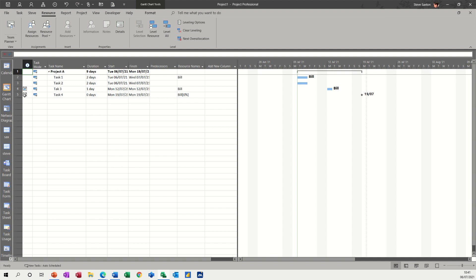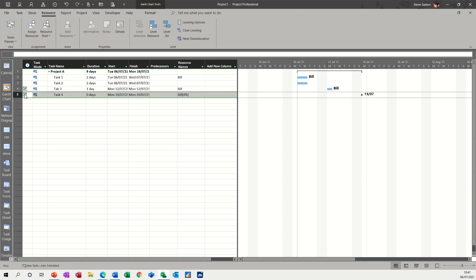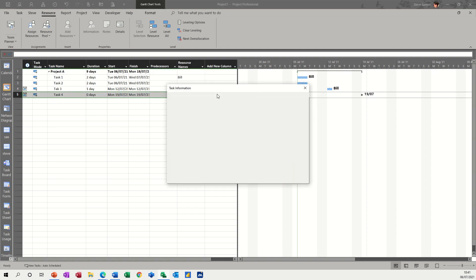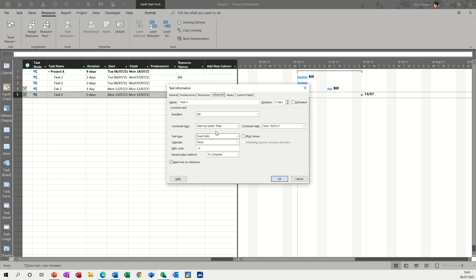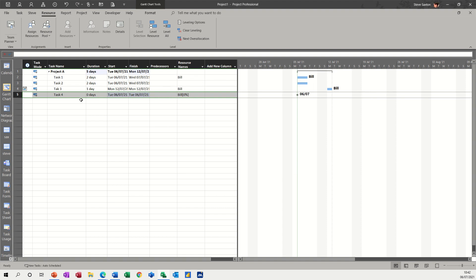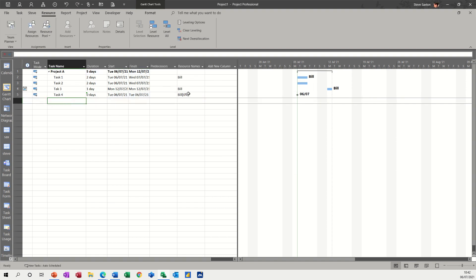So that might need to be manually reset. It's got a constraint there. So if I just go into this advanced, starting earlier than. So as soon as possible, get rid of that date. Everything's back as default. Click OK. Tuesday.